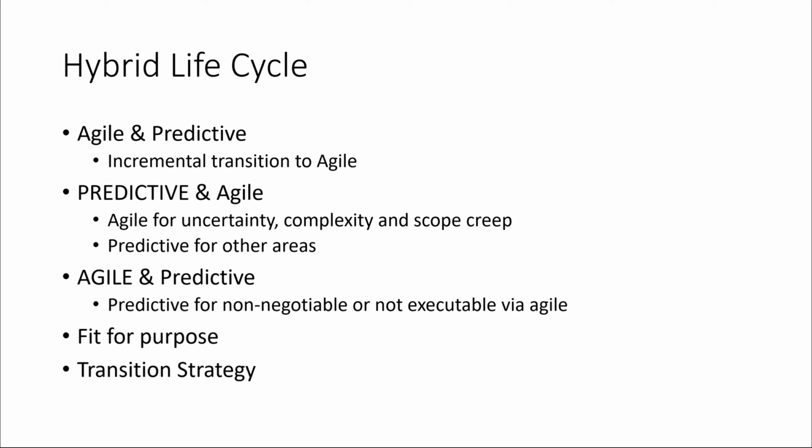Hybrid lifecycle as fit for purpose. Project teams may design a hybrid lifecycle based on project risks. For example, a campus construction project may have multiple buildings to improve and build. An incremental approach would focus resources on completing some buildings earlier than others, accelerating the return on investment. Each individual delivery may be sufficiently well known to benefit from a predictive lifecycle for that building alone.